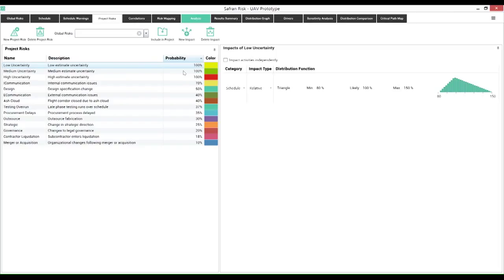So what's much more powerful about this is that whereas I've traditionally been limited to just one 3-point estimate per activity, here I can break down that 3-point estimate into the factors that make up that estimate, right? So you've got general estimate uncertainty because it may be new work. I've got some labor productivity uncertainty because I'm not sure of the quality of the labor. And then I've potentially got some contractor uncertainty because it's the first time he's done that type of work, right? It's new work or it's a larger project than what he's done before. So rather than just having to put one range on that activity, I can now apply three different factors.